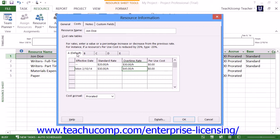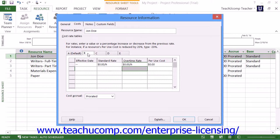Note that you are entering this information into tab A within the Costs tab. There are four other tabs you can use to enter different pay rate tables. The different pay rates shown on the different tables can assist you in using different pay rates for different types of work that a single work resource can perform — for example, a single work resource that earns one pay rate for painting work and another pay rate for roofing work.